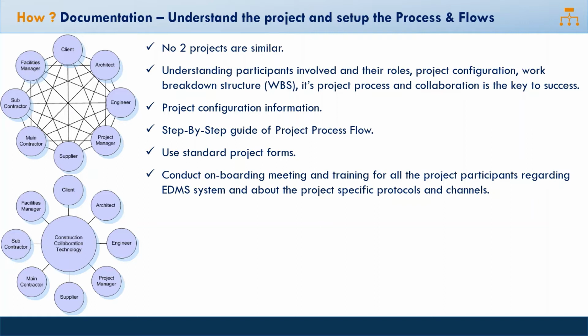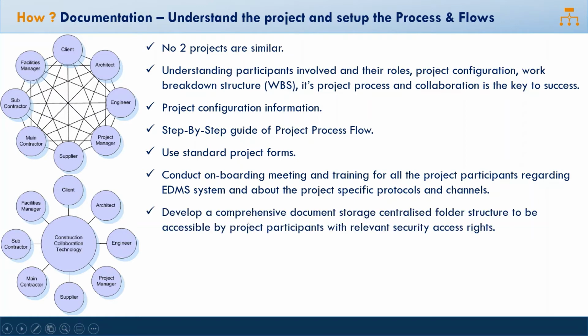The awareness and training of all the project participants has to be done about the document control system, and not only the document control system but also about the project-specific protocols and channels. How are they going to submit, to whom centrally will they be submitting it, who will be the single point of contact, and who will be their counterpart in each and every department. So this understanding and awareness has to be given to the onboarding project participants. That's very important.